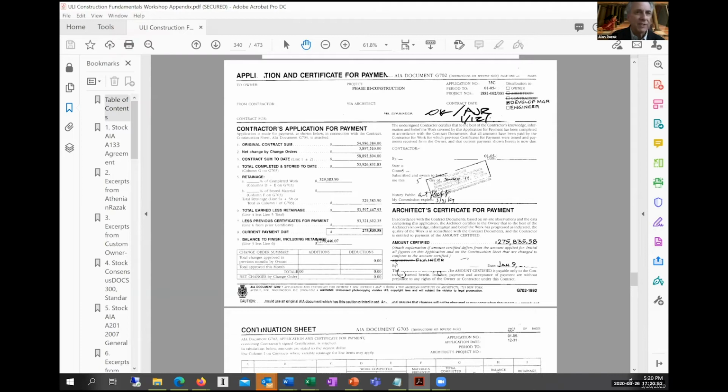If you look at the left-hand column, it basically says this. Here's the total cost of this job, the original contract sum, not guaranteed maximum price, original contract sum. Here are the net changes to that contract sum agreed to by the owner, architect, and contractor. So we started at $55 million almost. We're at 58.9 at this point, after all the change orders. And here's how much we've finished to date,